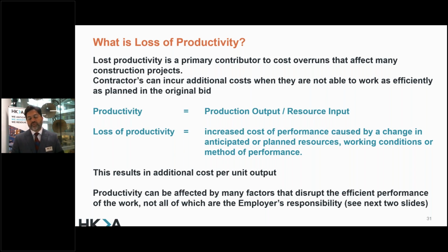I was on a site 4 or 5 years ago, and we were building a port. This was just before COVID, or during COVID. We had a lot of storms and inclement weather. Where the crane operations were planned for 3 days, the cranes just couldn't operate on those 3 days. It actually worked between 5 and 6 days because of the loss of productivity. Now you can go into an inclement weather position, but the problem is that activity was not on a critical path. The crane was only supposed to be on site for 3 days. So you're not asking for prolongation there, you're asking for disruption, because instead of 3 days, now your crane's on site for 4, 5, 6, or 7 days. The cost is direct labor and plant, not site prelims, etc. So that's disruption as an example.